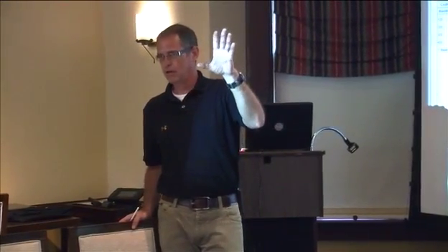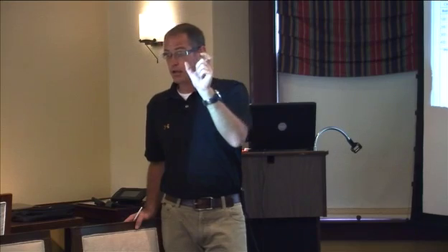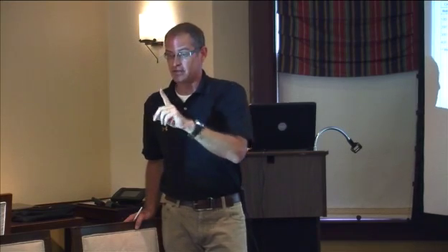I now know what it costs and how many hours it takes to put in 50 of those doors, by cost code. So that's the determining factor, right? That one item that you're looking at tracking. The heavy highway guys have got it easy because their breakdown is based on their billing and their line items that are on the billing.